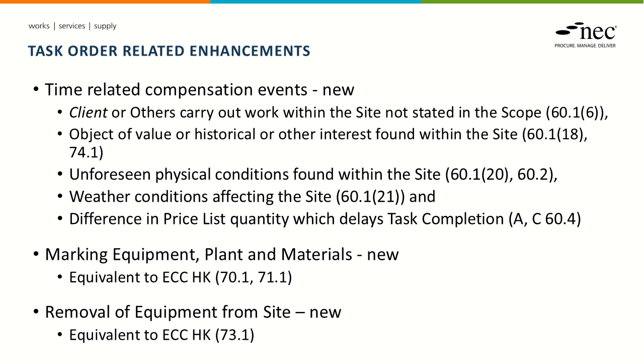So that's 60.1 bracket 6. We've also brought in ones to do with finding an object of value or historical or other interest within the site, the unforeseen physical conditions being found within the site, or the weather conditions. The weather conditions clause is the equivalent clause to the ECC Hong Kong version of weather conditions.